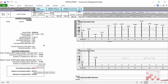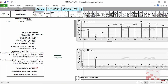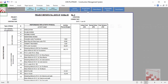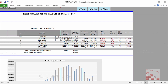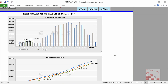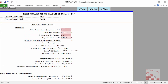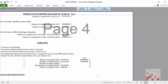CMS will produce reports showing activity performance, the earned value report showing the cost performance index and schedule performance index, the status report showing current project status (over budget or within budget, ahead of or behind schedule). Furthermore, CMS will give a forecasting report showing the forecasted cost for project completion — the Estimate at Completion (EAC) — automatically in monthly reports with the required charts and forecasting.